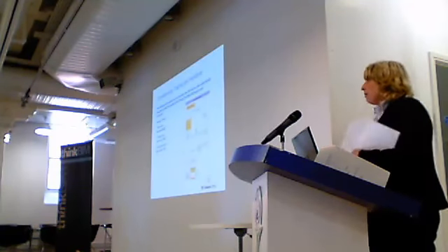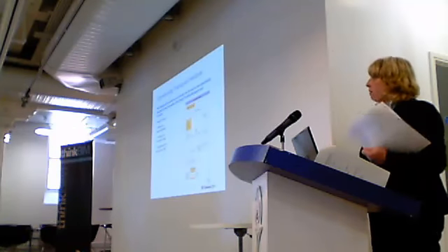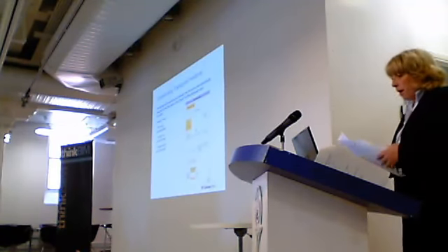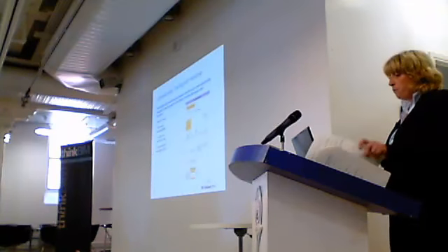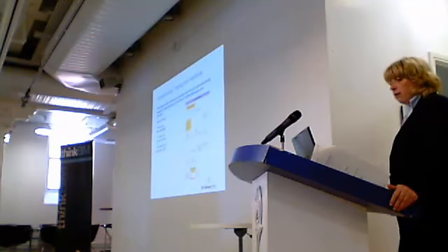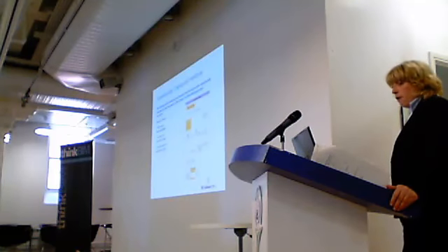Now I'm talking a lot about buildings here because our focus is currently on buildings, but there's no reason why this can't go into infrastructure as well. Our first phase is to focus on buildings. Commissioning, training and handover, I've already spoken about that. This is where we really need to improve, making sure that we've got the roles and responsibilities tied down, that the testing and commissioning is done very early, and the engagement of all the operational staff, including FM.